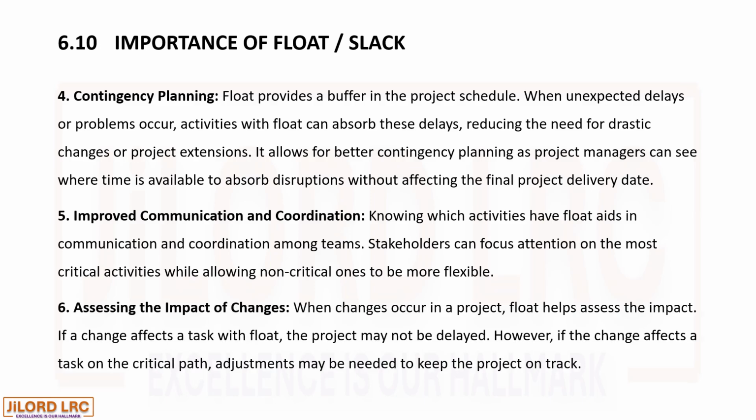6. Assessing the impact of changes. When changes occur in a project, float helps assess the impact. If a change affects a task with float, the project may not be delayed. However, if the change affects a task on the critical path, adjustments may be needed to keep the project on track.